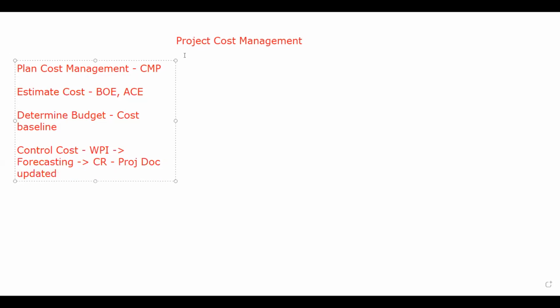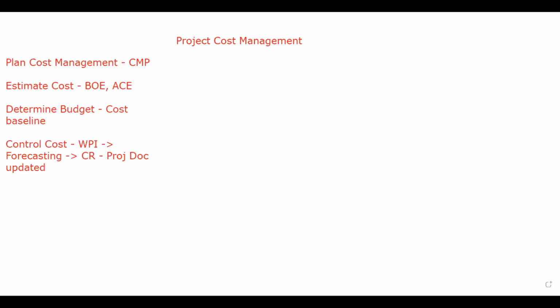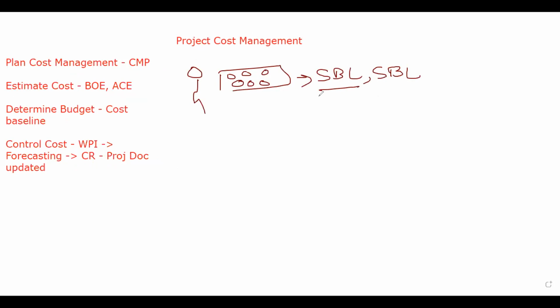These were the processes. How things happen, again, let me begin from the initial point. When the project manager starts the meeting and everyone provides their project management plan, the knowledge area management plans, then we receive the scope baseline and the schedule baseline is achieved. Here we have the scope statement, WBS and WBS dictionary. On that basis, we created our schedule baseline, where from work packages we took out the activities, and from the activities we sequence them and so on.